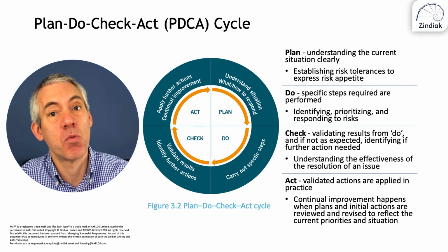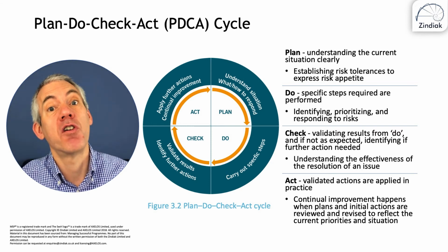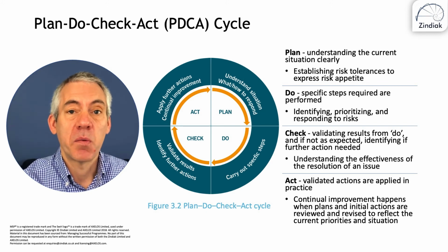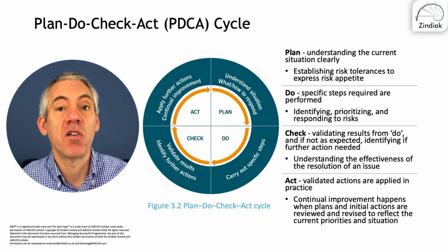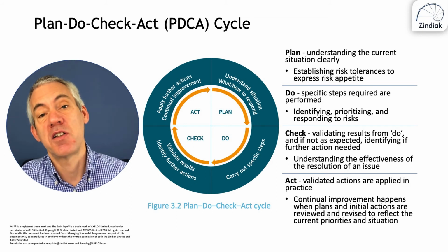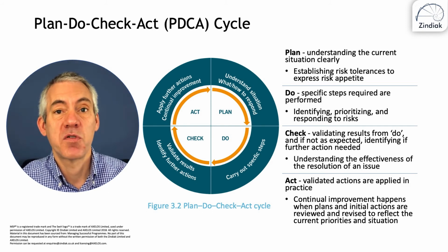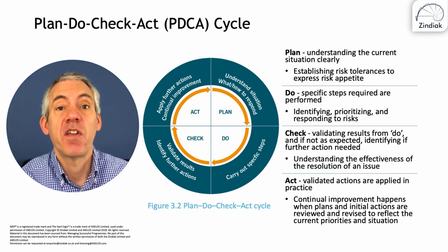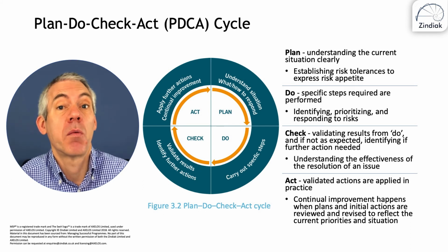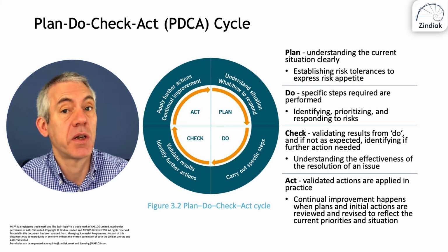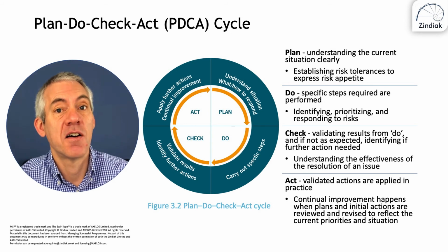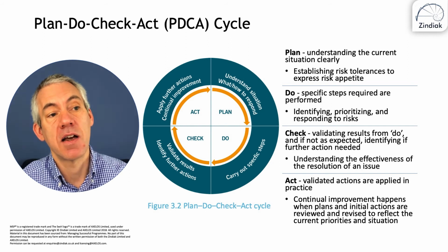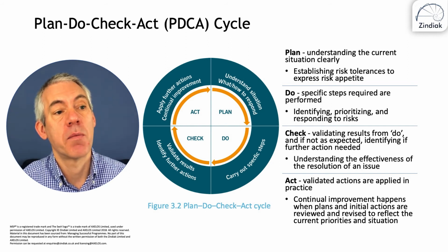We're not prepared to accept more risk. So if we think we're going to go over £110,000, or the other way as well, if we were going to spend less than £90,000, then that's beyond our risk appetite. We think spending too much would be too risky. The business justification wouldn't be there. But equally, if we don't spend enough, we may feel that the quality of the delivery of the programme would suffer. So we don't want to do that either. So we need to be between 90 and 110. That's our risk appetite expressed as risk tolerances, and that is important for the exam.